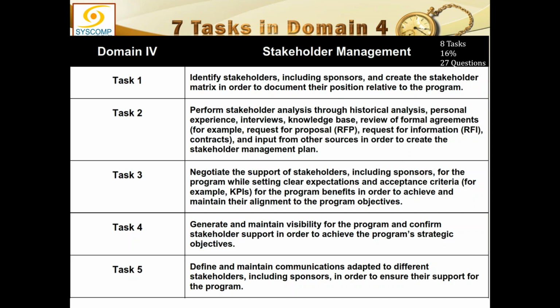Prioritization. Actually, I think stakeholders are just like risks. You deal with stakeholders exactly like this: you identify the stakeholders, then you qualify the stakeholders, then you do the quantitative analysis. Although there are not so many processes mentioned as such, actually you are going through all of these processes. So after you have done that, you properly understand, and you have a response developed at that stage for how to deal with each and every stakeholder.